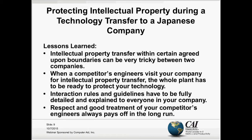Detailed preparations and training of my people for my company's intellectual property transfer to this Japanese company were the key elements for success. Even the Japanese company executives praised my project management skills to my superiors. Lessons learned: intellectual property transfer within certain agreed-upon boundaries can be very tricky between two companies. When a competitor's engineers visit your company for IP transfer, the whole plant has to be ready to protect your technology. Interaction rules and guidelines have to be fully detailed and explained to everyone in your company and to your customer. Respect and good treatment of your competitors' engineers always pays off in the long run.